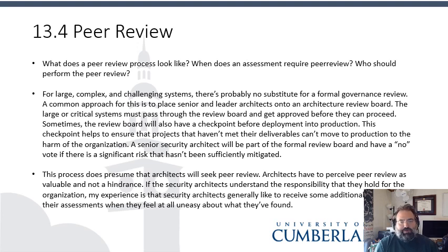For large, complex, challenging systems, there's probably no substitute for a formal governance review. A common approach for this is to place senior and lead architects onto an architectural review board. The large or critical systems must pass through the review board and get approval before they can proceed. Sometimes the review board will also have a checkpoint before deployment into production.